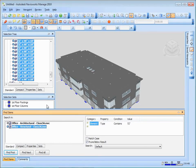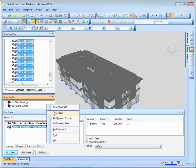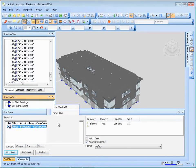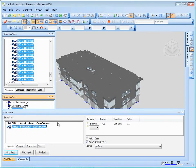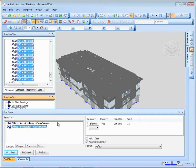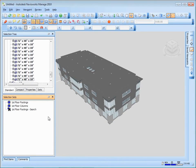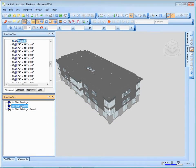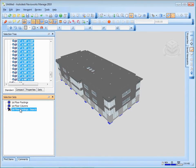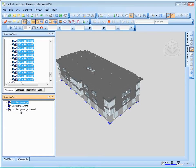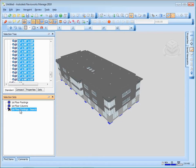If I want to save this, I can say add the current search. And let me close that up so you can actually see. There it is. Okay. Now what's the difference? The difference between this one, which is static, and this one, which is dynamic, is that if I add some more things that say 72 inches, they're going to get added in there kind of very nicely for you. It'll sort of update. So searching is almost always better than selecting.